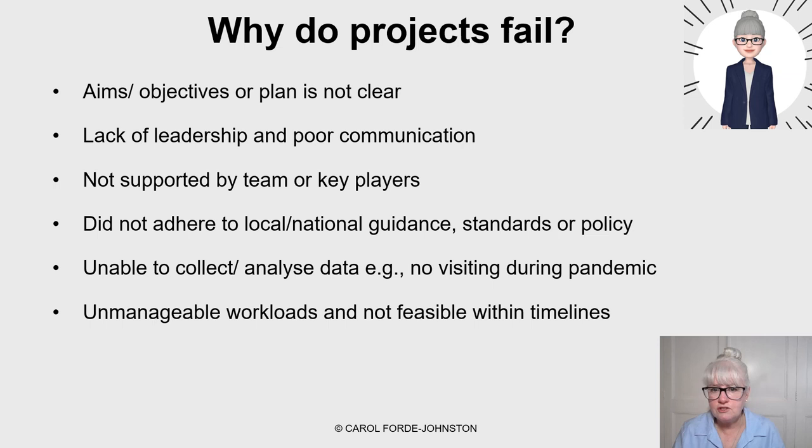I know with doing my PhD project, with the pandemic, it's caused a lot of delays, but an example might be a study that requires visitor feedback. So anybody doing a service improvement project when the pandemic hit and there was no visiting would have been delayed. Unmanageable workloads. As I said, you need to think about who the project lead is, is it manageable with their workload, and it has to be feasible, and the timelines have to be feasible as well, and having support and a team to help inform those timelines. If you've got a research development lead, for example, that you can talk to, and go on the quality improvement local hubs, you'll have people that might have done similar projects and people to advise about quality improvement projects.